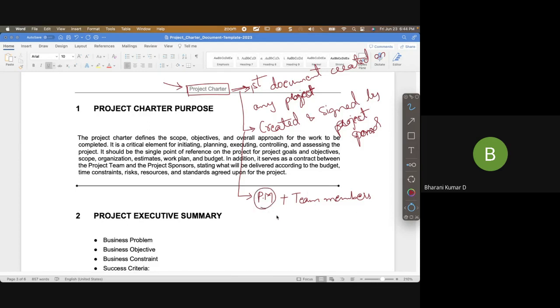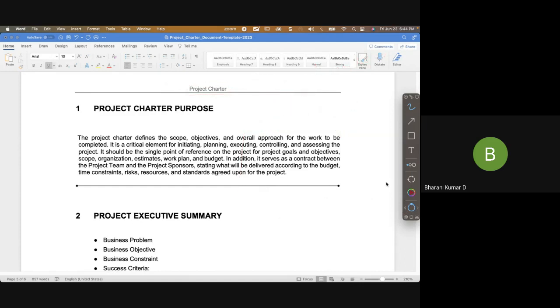That means the project manager's name has to be mentioned upfront before the project starts. The second point is that this project charter contains only high-level details.